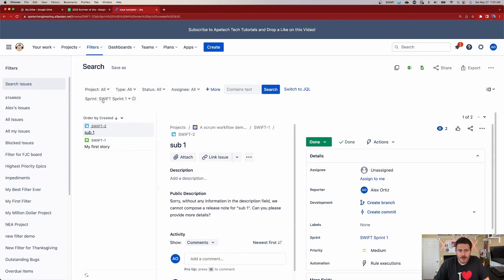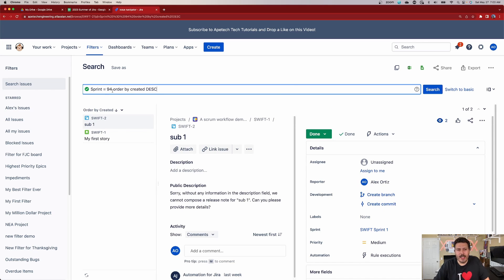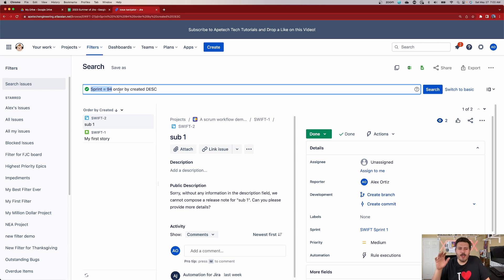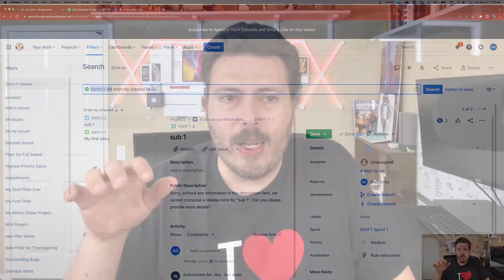So once you know which Sprint you want, all you got to do is switch to JQL and look at that — it's going to tell you your Sprint ID right there and do all the conversion for you. You don't have to go on this mystery of 'what's my Sprint ID?' It's super easy to get it if you go this route. Those are my two tips. Hopefully they help you out. I know that finding that Sprint ID can be a tricky thing, which is why I wanted to start the Summer strong with helping you find that Sprint ID.